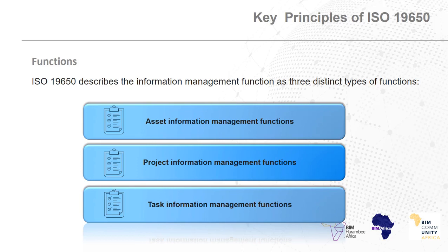To support organizations that have not yet adopted information standards, ISO 19650 has simplified the information management process. The responsibility for information management is distributed across the whole team, with individual parties being given specific tasks. However, each party has flexibility in completing these tasks. For example, they could delegate it within their team or even employ a third party to complete it.